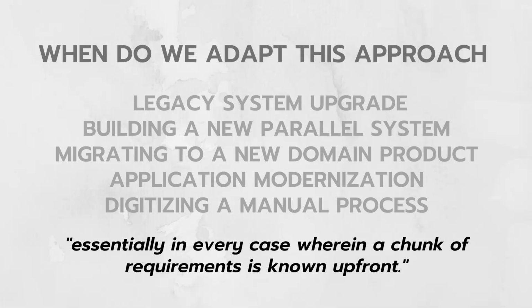Now, when do we adopt this approach? There could be certain situations wherein we would be adopting this approach. Usually, whenever we know a certain portion of requirements upfront, that is the ideal time wherein we adopt this approach. For example, a legacy system upgrade. Now we have a system with us which has the requirements in place. So if we would like to upgrade that system, we can go with this approach. Like building a new parallel system.